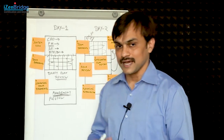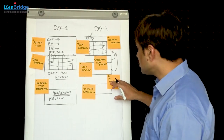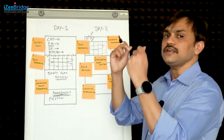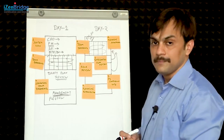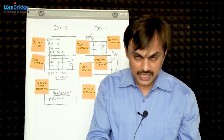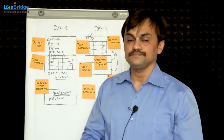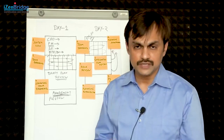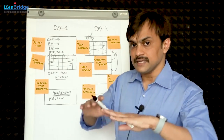Assuming the risks were acceptable - that is the best judgment taken together by business owners and the development team - then we move forward and talk about an exercise which helps us check the confidence of the whole Agile release train for this particular PI planning. We take something called a PI confidence vote. As you have learned, the complete Agile release train is participating here - each Agile team, business stakeholders, everyone. The PI confidence vote is taken first at a team level - each team, how confident they are feeling for their part of the work to get achieved, their part of the commitments, their part of the objectives.